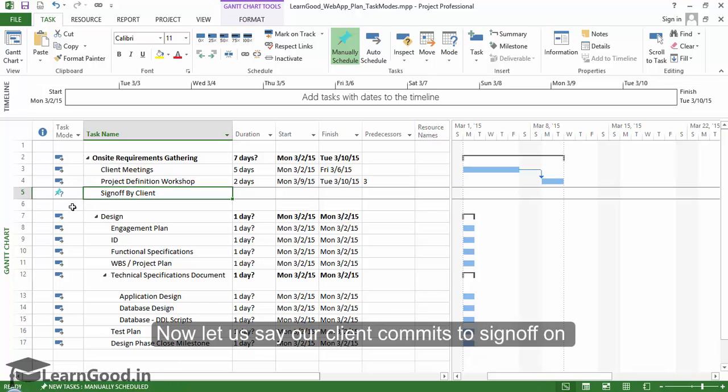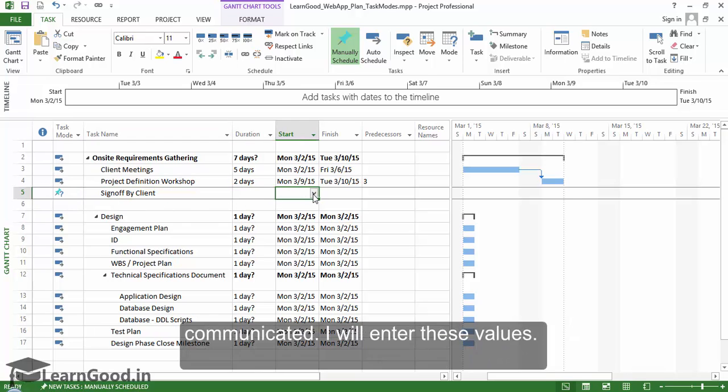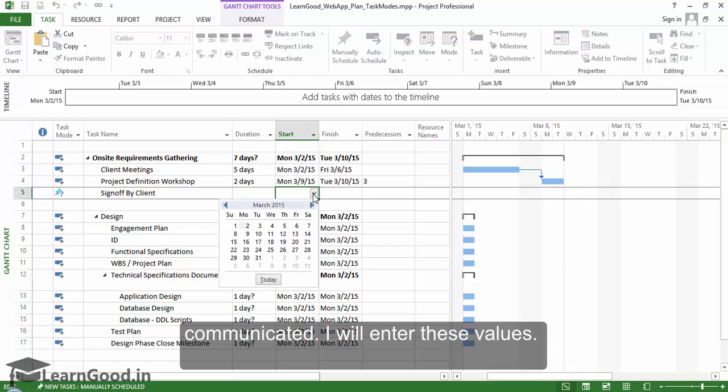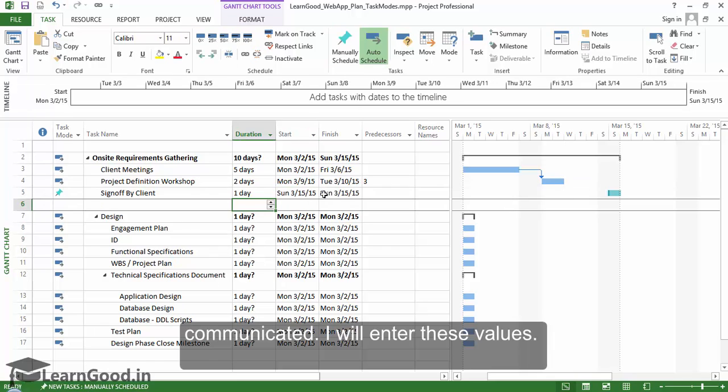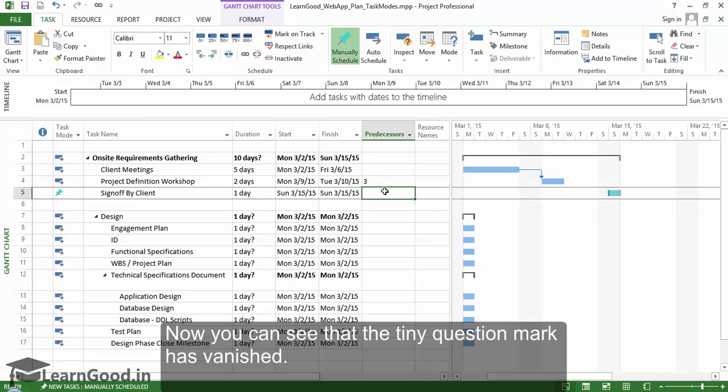Now, let us say our client commits to sign off on 15th March, and it will take one day for this to be communicated. I will enter these values. Now, you can see that the tiny question mark has vanished.